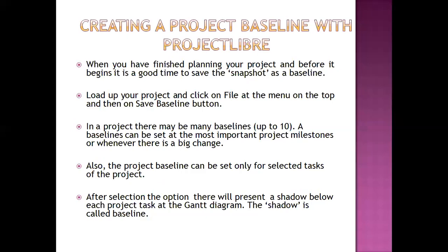These are the steps which can be learned for the baseline in the Project Libre tool. The first step is, when you have finished planning your project and before it begins, it is a good time to save this snapshot as a baseline. Load your project, click on the File menu at the top and then on the Save Baseline button.